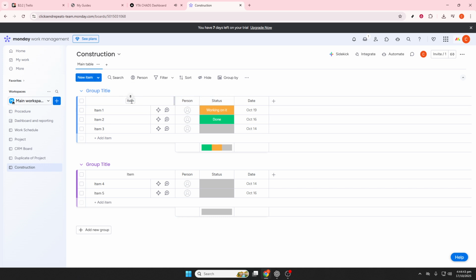Managing subcontractors and inventory through separate boards can help keep your task management organized. By linking subcontractors to project tasks and managing materials through an inventory board, you ensure that orders and deliveries are tracked efficiently. Automating notification processes when materials are required can help smoothly align procurement with project needs.